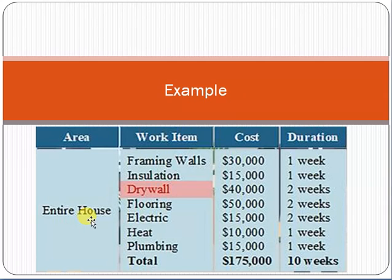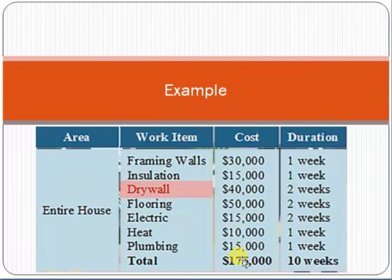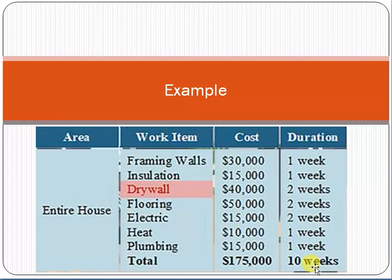So to build a house, you divide the work into smaller chunks — items you can estimate in terms of cost and duration — and then sum them all up to get the total. The result: $175,000 in cost and 10 weeks of time. This estimation is more accurate because you are decomposing the whole project into smaller chunks and calculating estimates for each. The trade-off is that it requires more time to do.